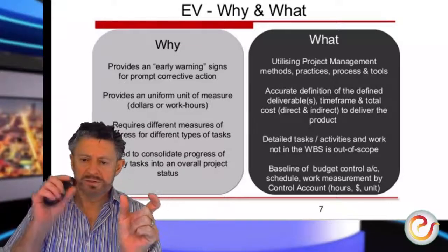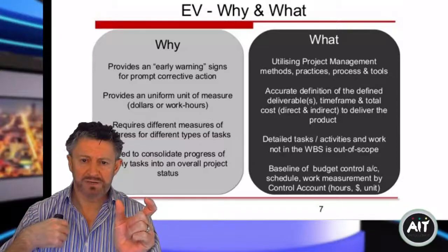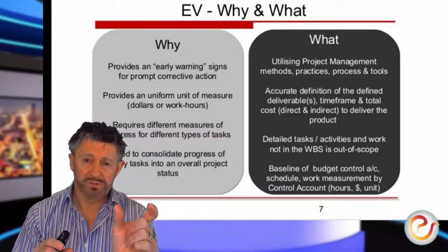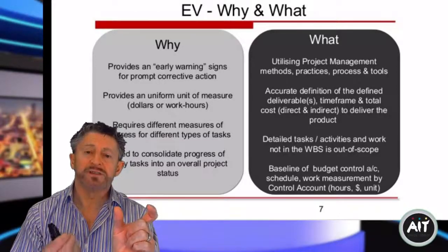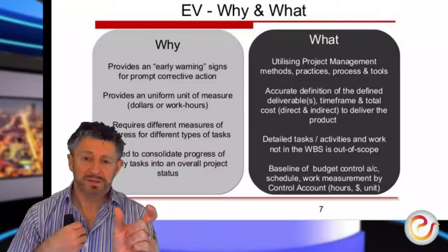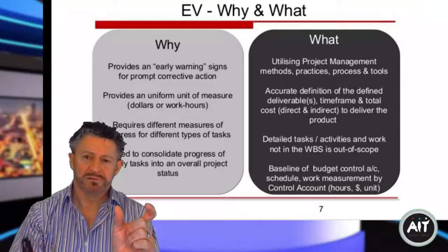So one component, 15 minutes on that machine. So the machine cost plus my cost for 15 minutes, that's how much it costs to produce one component. Okay, and that's often referred to as the man hour cost. The cost of me as the person and the cost of the machine. Combine the two of those.